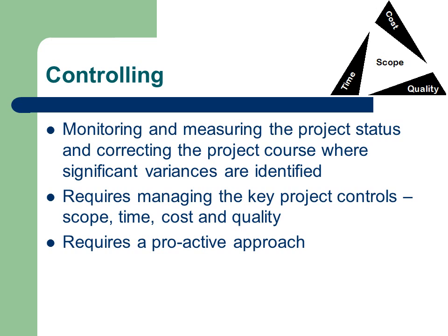For example, if the project is running behind schedule, a decision needs to be made to either obtain approval to extend the schedule, bring on more resources, work overtime, or reduce scope. Each option must be carefully considered and a recommendation made to the sponsor. The outcome will depend very much upon the project itself and the priorities associated with it. For example, extending the schedule may not be possible if you are required by law to launch your project by a particular date in order to comply with legislation.